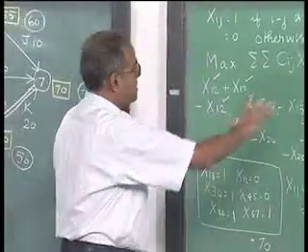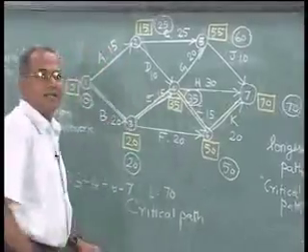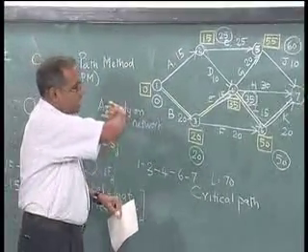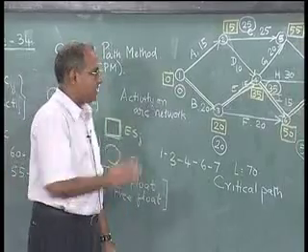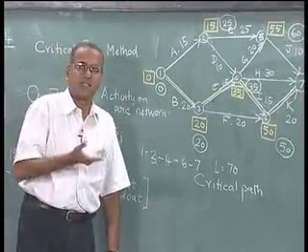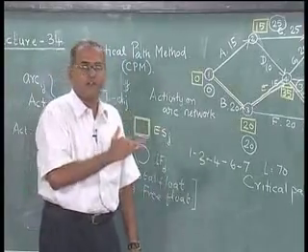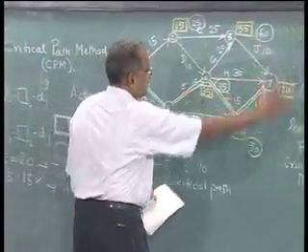So, this is the relationship between the primal and dual of the longest path problem. The critical path problem can always be formulated as the longest path, and a simple forward pass and a backward pass of the Dijkstra's algorithm suitably modified for the longest path would give optimal under these circumstances.